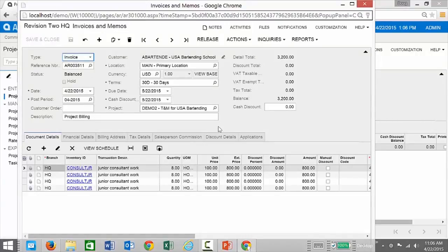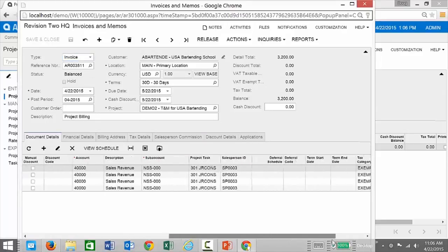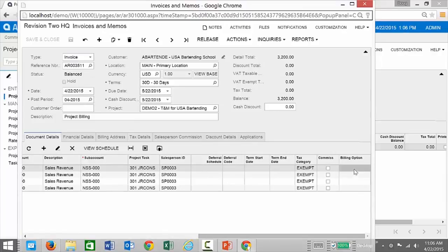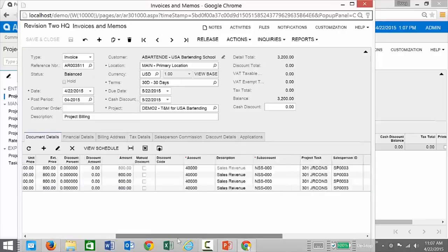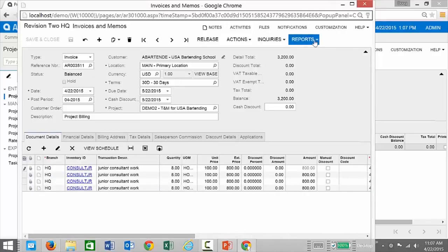Once again, if you're not happy with this bill, you can simply delete it and then rerun it. If you need to, there's many advanced features. So if you need to say, well, my customer is a little leery of getting, since I selected bill on demand, they're really not expecting a bill for this much at this point in time, I can select the bill later option. That will mean this line item will still be set up within Acumatica, but it won't actually go ahead and bill it, so it can be billed on a future bill.